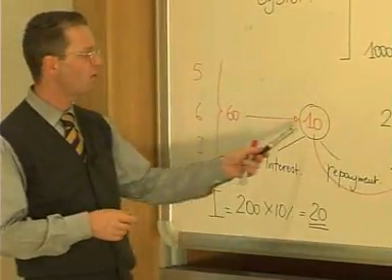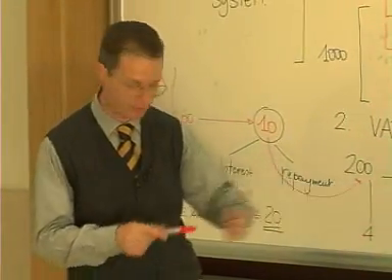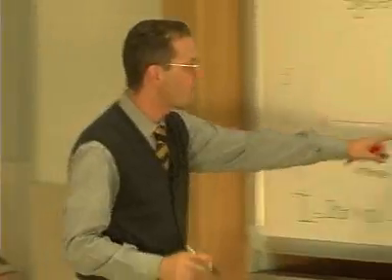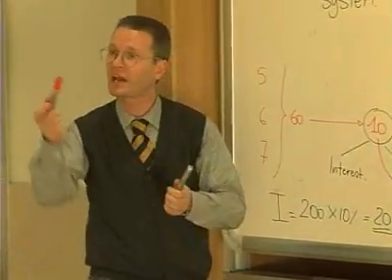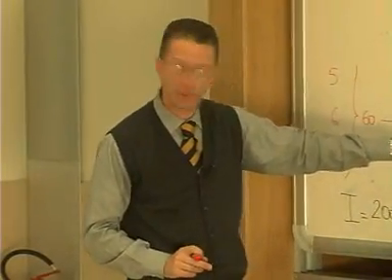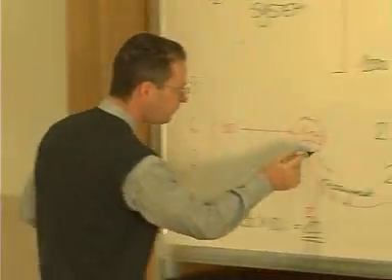Sufficiently clear for you? Remember, if on the other hand, in normal conditions, we find a value of revenues that is larger than this one, suppose for example that in year number 5 you get a value of revenues of, let's say, 500, and so the value-added tax that is being cashed in on this value of 500 is 100. This 100 is used, 20 in order to repay interest, and the remaining amount of 80 is used to repay the original amount of loan, 20 and 80.